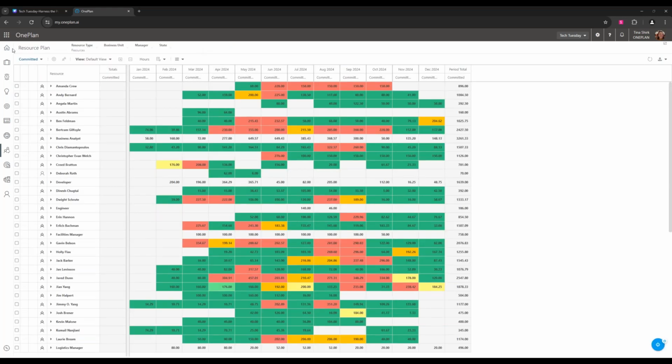I'm going to go to the next icon here, which is the add booking icon, which Deb mentioned before. So in this global resource plan view, as the resource manager, you're able to add these different bookings to different plans in OnePlan for your resources. So bookings is a quick way to allocate resources or teams of resources to resource plans. They are set for a certain time and will allocate the resource or team evenly across that time period.